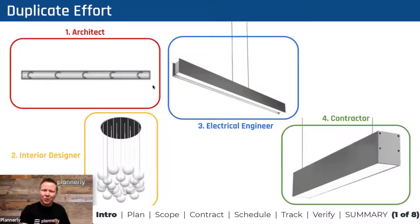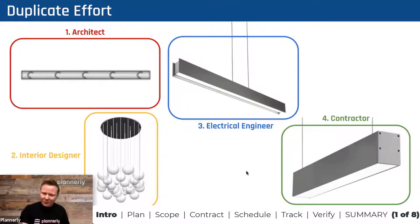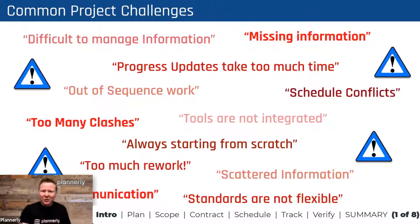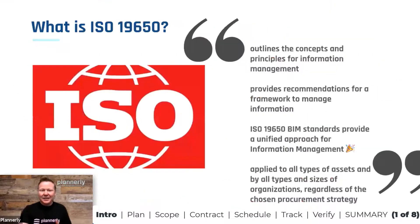If nobody knows what they're supposed to be doing, we can end up with a lot of duplicate effort. In this example, we have the same light fixture being modeled by four different parties on a project, and that is wasteful. It is unnecessary, but it occurs a lot in our design and construction industry. We can end up with out-of-sequence work, too many clashes, lots of rework, lots of conflicts, and data that's very difficult to understand.